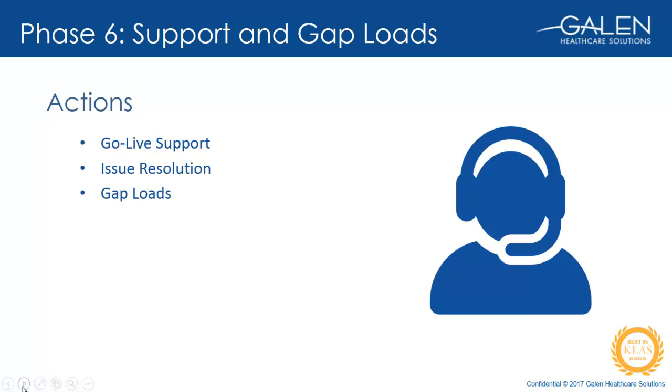At least one big consideration when working out the plan for gap loading of data is how accessible is the data to the technical migration team. So for example, in one of the migration projects I've worked in, there is a tertiary vendor involved with providing the data extract. So therefore, we have a limitation there that we need to work with. And sometimes there is a cost associated to getting a copy of the data, and the client typically will have to absorb that fee. So sometimes, how the data is hosted and who is controlling the exports can be a big factor as far as planning gap loads.